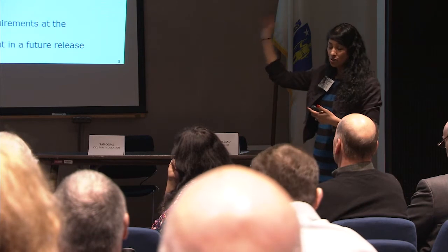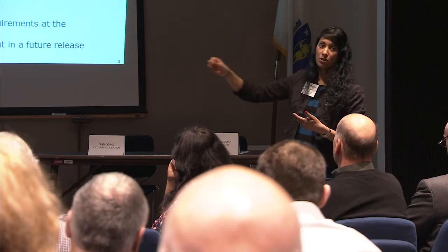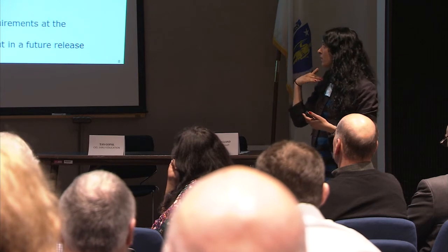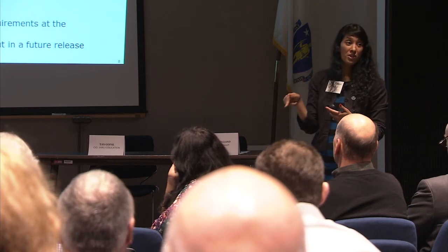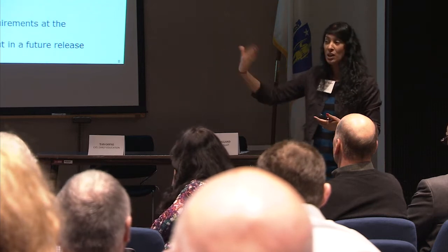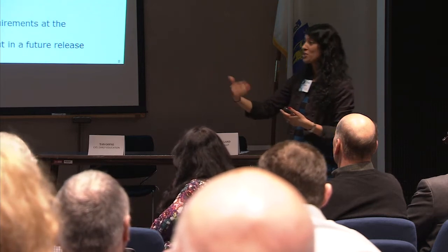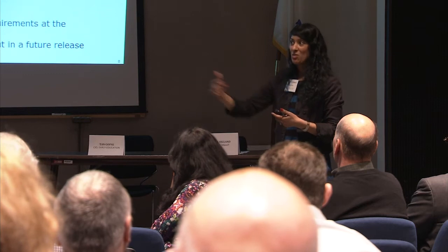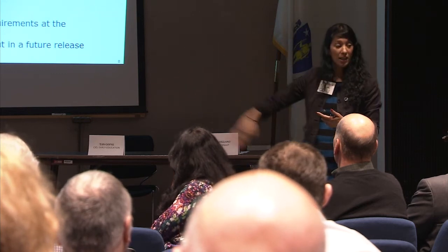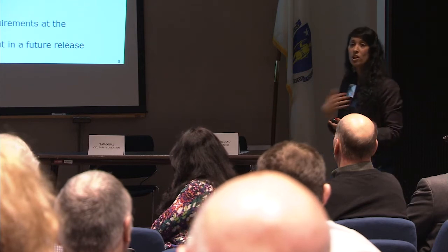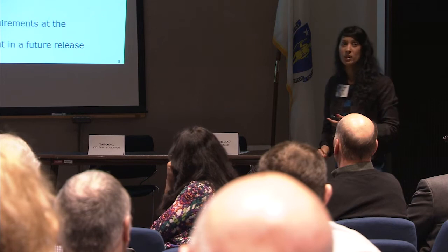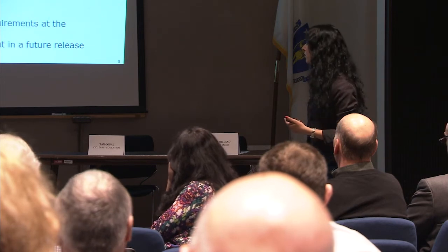And it's very essential to time your vendors appropriately when you're using Scrum or Agile, because in this particular example, we onboarded our QA vendor way too soon. Again, we're doing sprints, we're doing incremental functionality. We onboarded them where we would have on a traditional project, and then we ran out of money. We extended it a little bit, but then they were gone. But because we were using Agile, we could absorb the QA within our team, so we were okay. Ideally, I would have waited a little bit longer to onboard them.